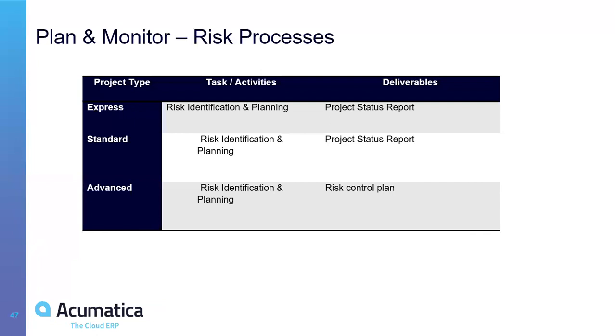Yeah, sure, I agree. So yes, definitely, it has to be documented. Where to do it? In my opinion, there are two main approaches. One is making it part of the status report that you send every week. The status report has four parts, right? This is what we did this week. This is what we do next week. These are the issues we are working on, and these are the risks we have identified. And include the stakeholders and the senior management in the distribution list for this status report.